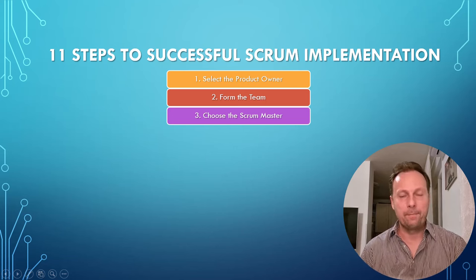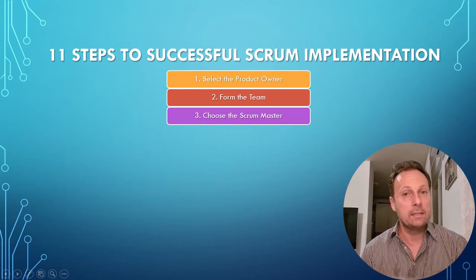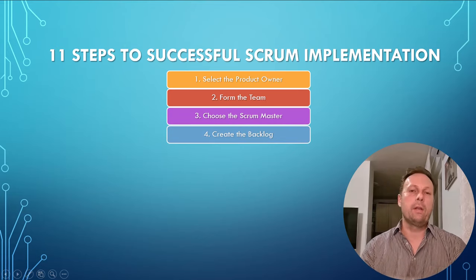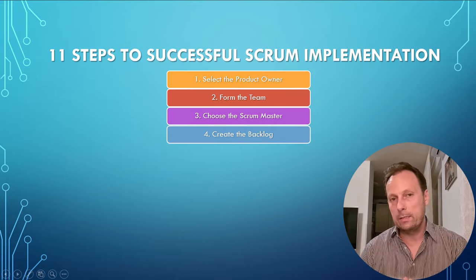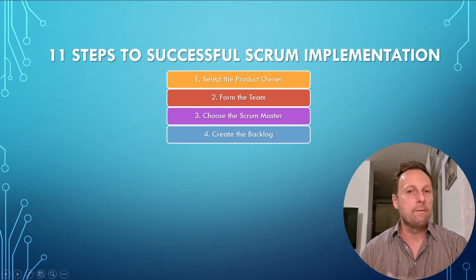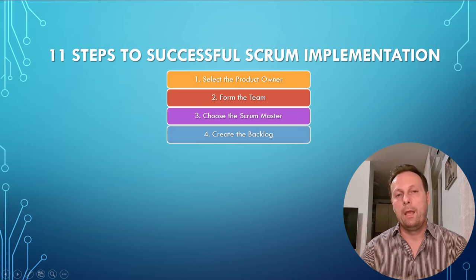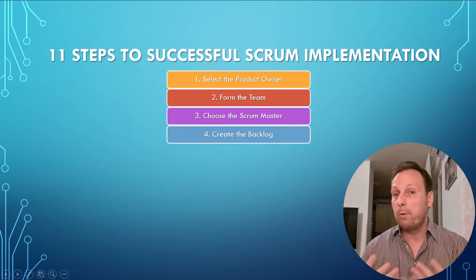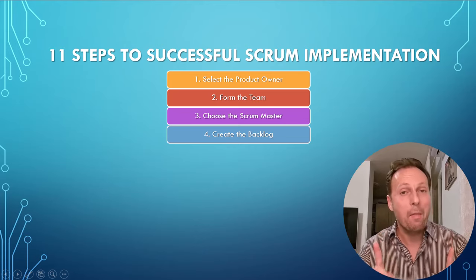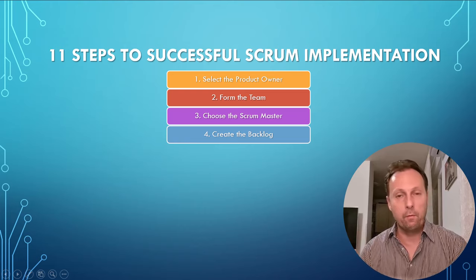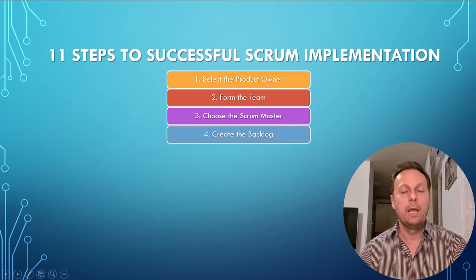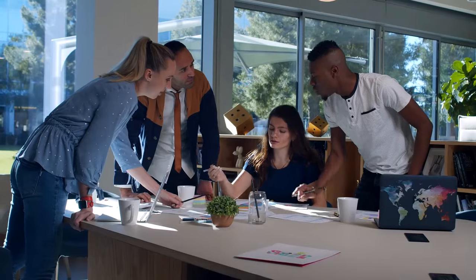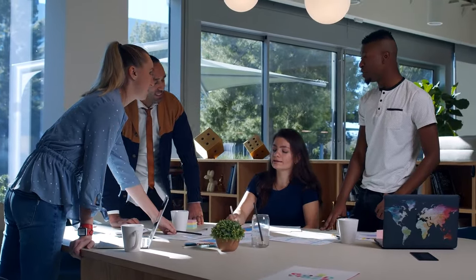Step three: choose the Scrum Master. This person guides the rest of the Scrum team throughout the Scrum framework, helping them eliminate anything that slows them down. Step four: create the backlog. This is the high-level list of everything that needs to be done or created to turn the vision into a reality. This list evolves during the project's life cycle, serving as a road map. There is only one backlog, and the product owner is responsible for prioritizing it. The product owner should consult with all stakeholders and the team to ensure alignment between what people want and what can be produced.